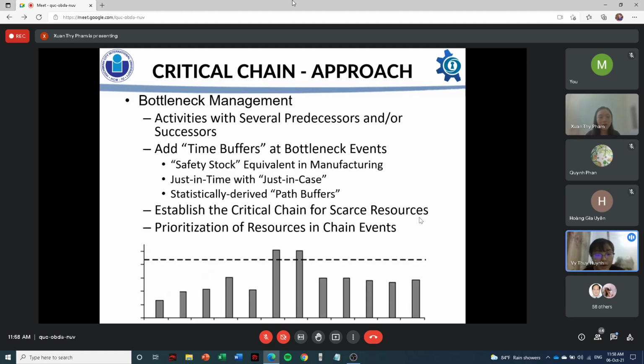So, how does the critical chain method work? It emphasizes the critical chain and not the critical path as a project's constraint. Here is a look at how it works. It uses 50% of the probable activity time. It makes use of buffers to account for the uncertainty in activity performance and estimates.